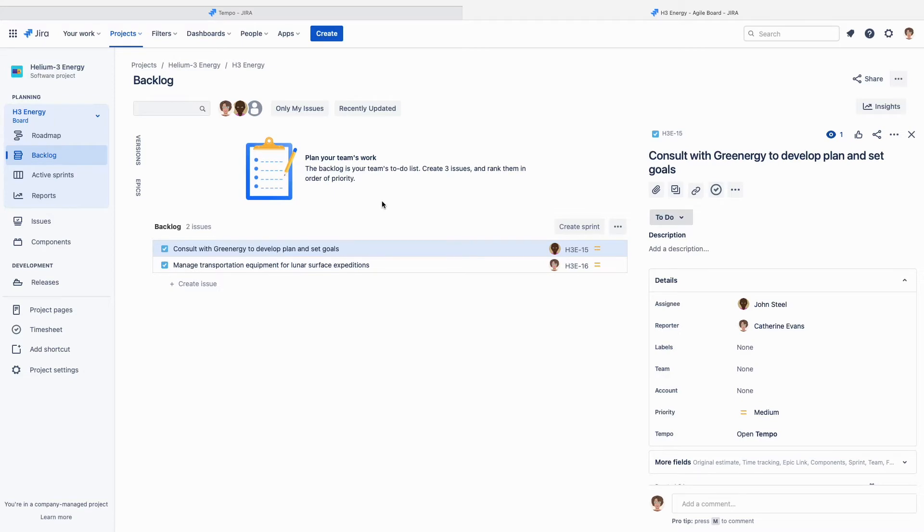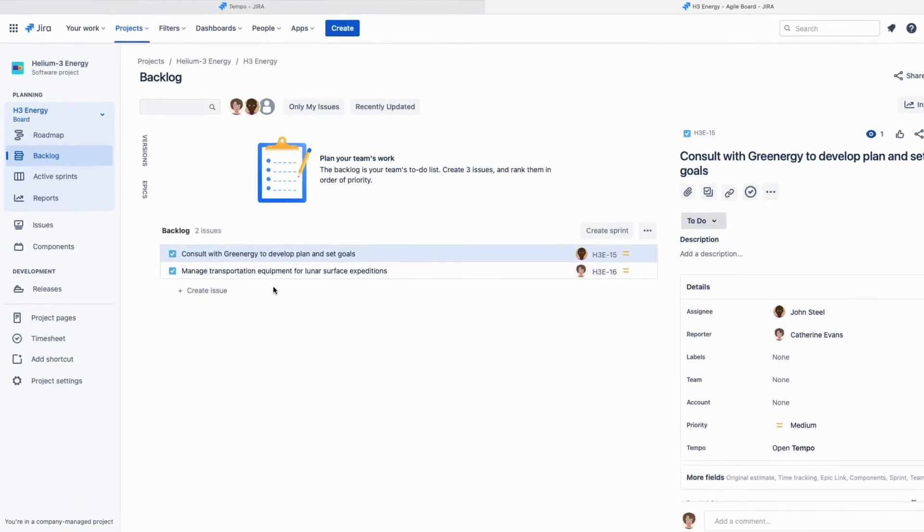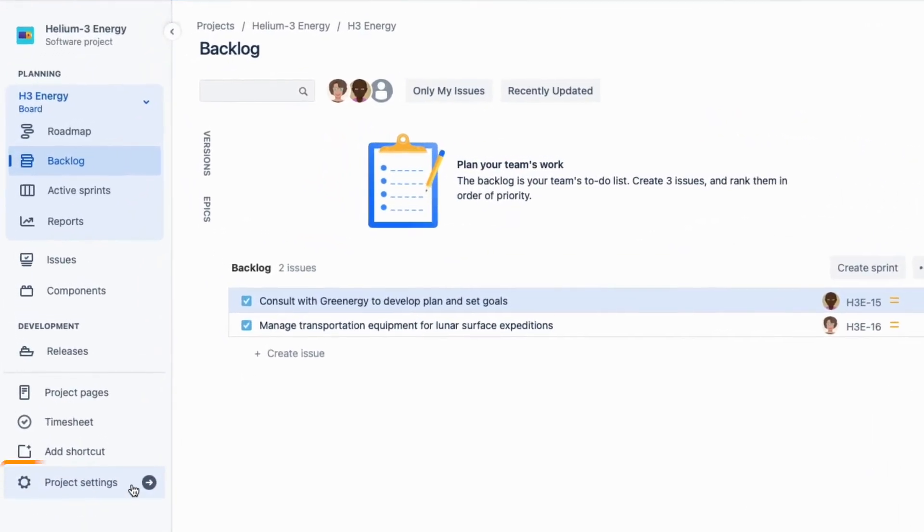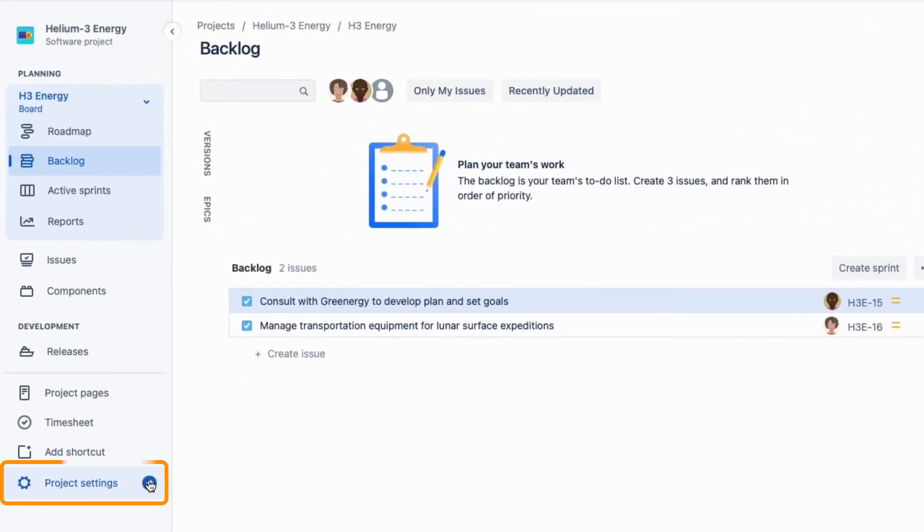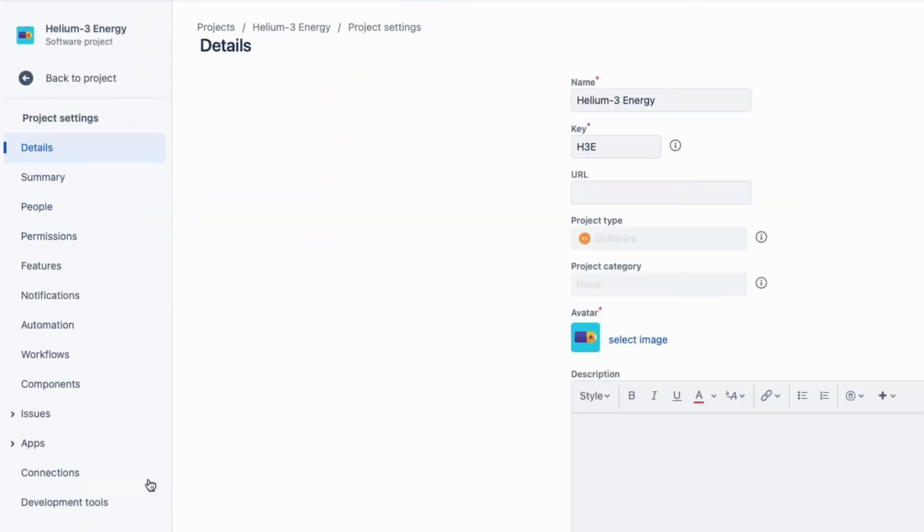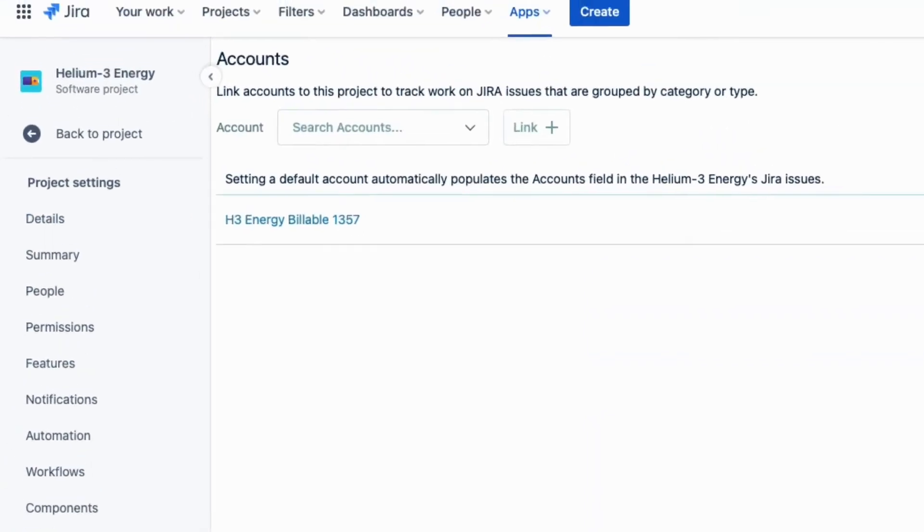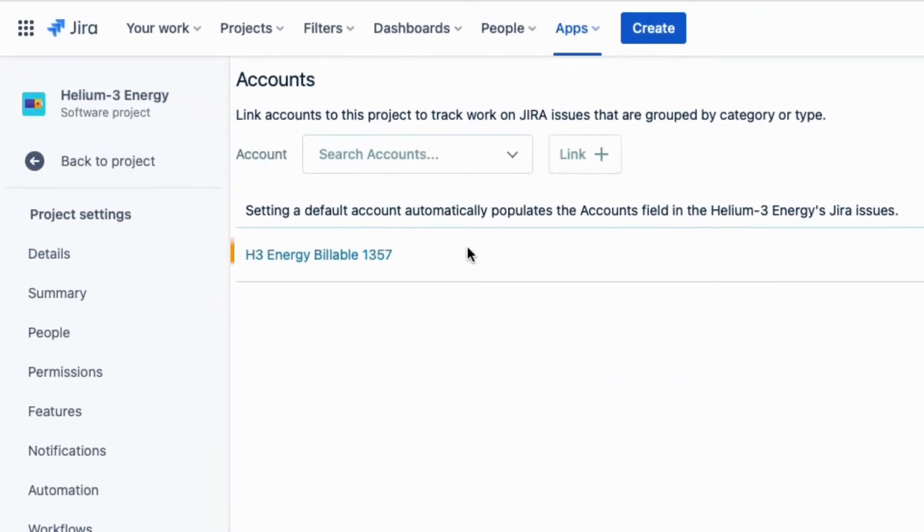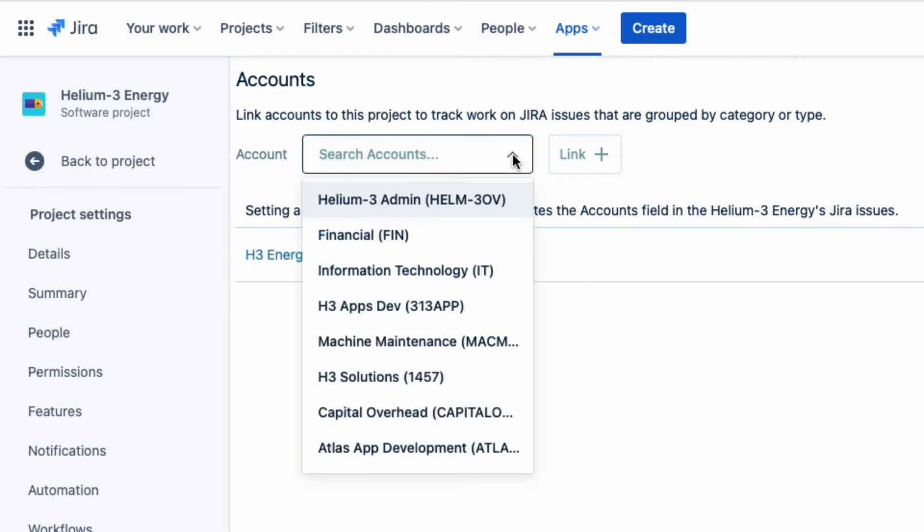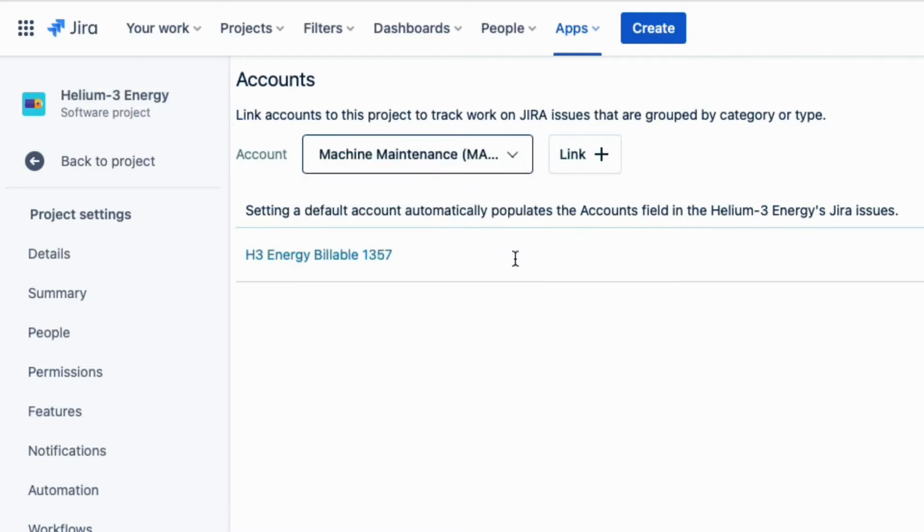Luckily, this is very easy to do. I go to the project settings, then select apps and accounts. At the top, you can see the account that I linked to this project when I created that account. And I can link an account here too, which gives you yet another way to do this.